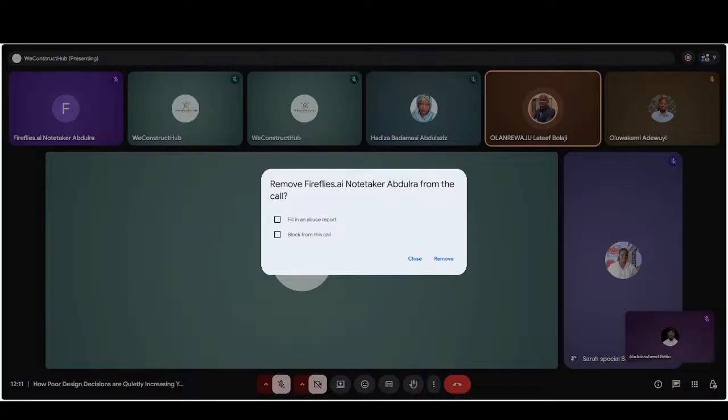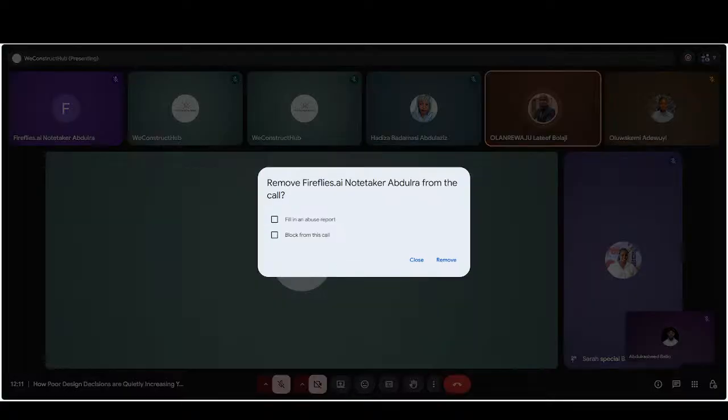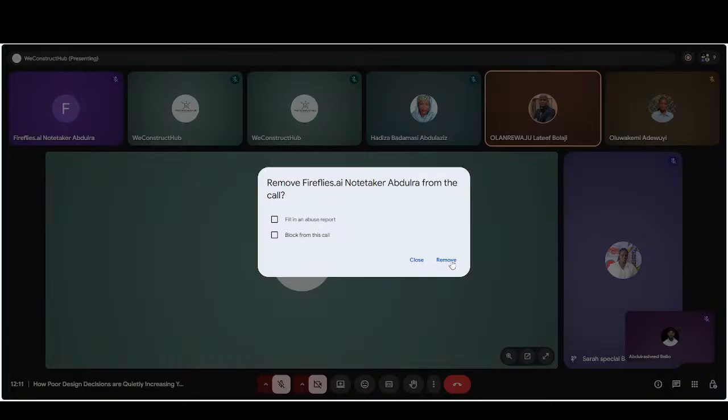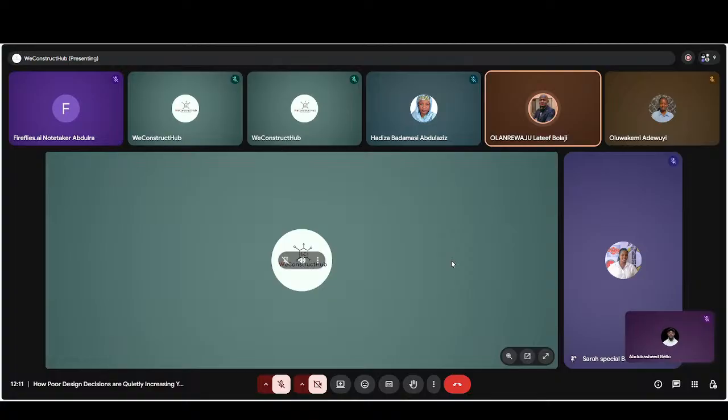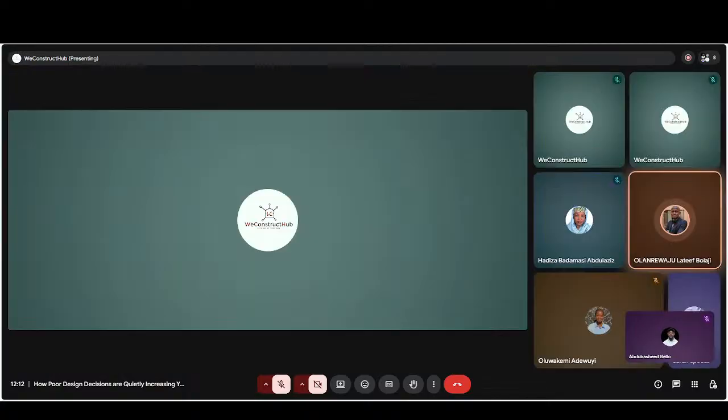So we need to be up to date with price change. That will help us a long way. PPI is the most reliable signal that we have at the moment. Never use historical data, except if you want to run a trend analysis and have a report that shows the difference in price from last year to date. But if you are going to be working on projects,